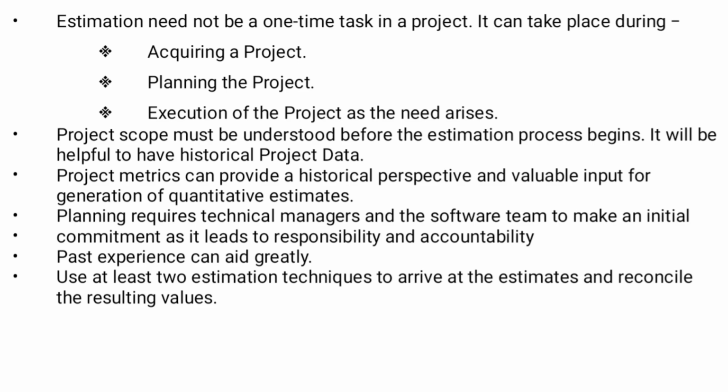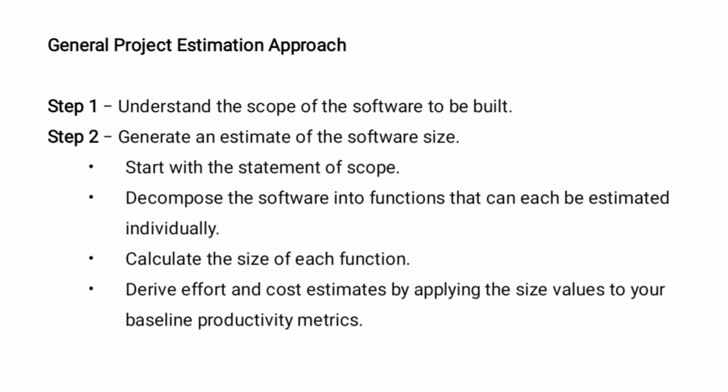Planning requires technical managers and the software teams to make an initial commitment, as it leads to responsibility and accountability. Past experience can aid greatly, that is, previous experience can be helpful for this. Use at least two estimation techniques to arrive at the estimates and reconcile the resulting values.